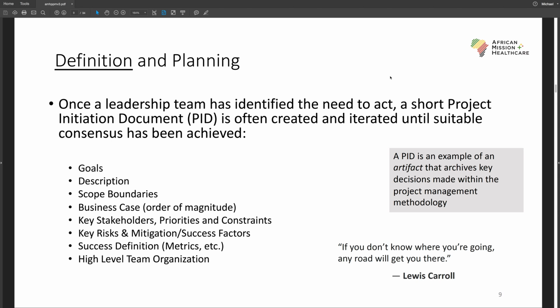And that metric, the more precise we can be with that metric, the better definition of success we have, and it helps us make decisions during the project as to how we're going to execute the project. And sometimes it requires us to add buffers. For example, rather than an acreage of maize field, we might have an acre and a half, because to achieve our volume goals, we want to give ourselves a little bit of an extra buffer.